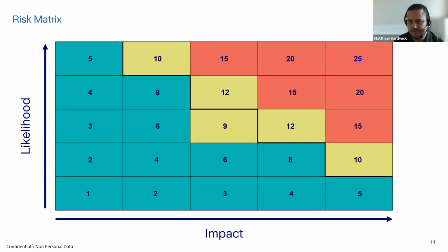I've seen other organizations that have talked about percentage budgets, things like that. But it's supporting information that ultimately is helping that initial gut feel come to life. And again, with likelihood, what do we mean? What's a 3 and what's a 4? Well, do we think it's going to be the next 6 months, or are we talking the next 12 months, or are we in the next 2 years, or are we in the more immediate sense saying, do you know what, this is going to happen in the next month, and that might be high likelihood area. So that's your matrix. Yours may look slightly different, but at its purest sense, they're all very, very similar and try and do the same thing.